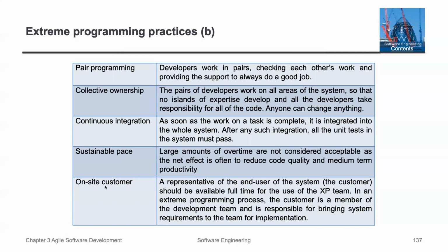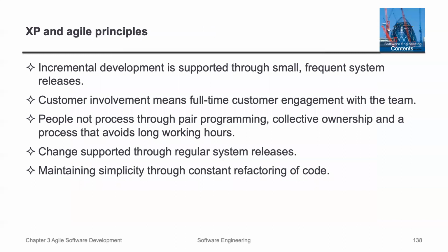It makes sense to have an on-site customer. A representative of the end user of the system should be available full-time for the use of the extreme programming team. In an extreme programming process, the customer is a member of the development team and is responsible for bringing system requirements to the team for implementation.